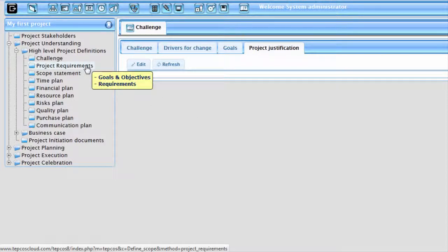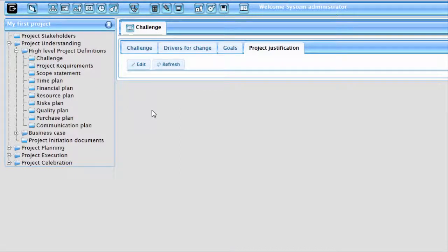Before going to the next step in the project menu, the step Requirements, you need to make sure that the information that you just have entered is correct and complete. Of course, you could already enter the requirements as you see them, but the completeness needs to be verified with all relevant stakeholders. And you can only do that by consulting them before you can complete the requirements.